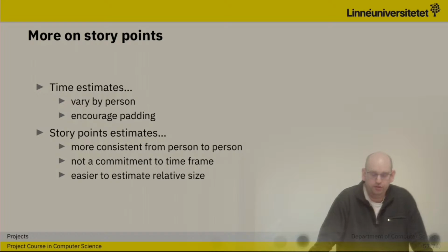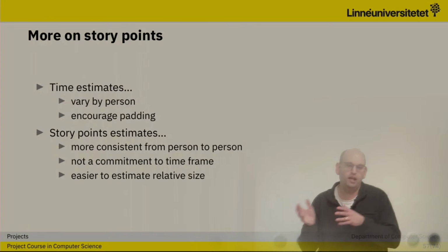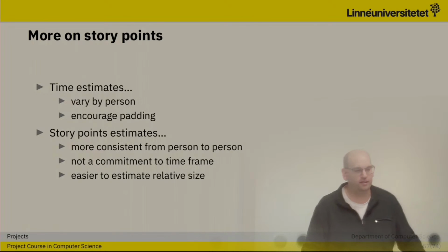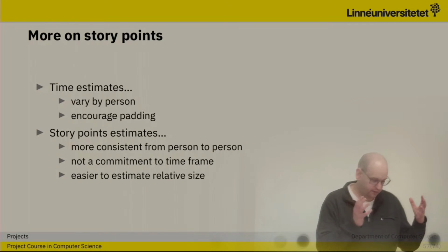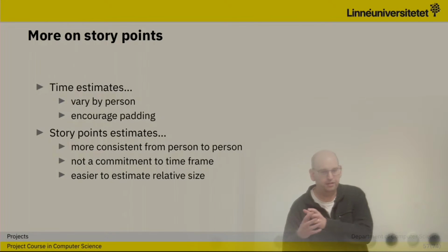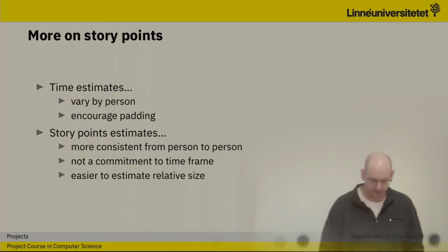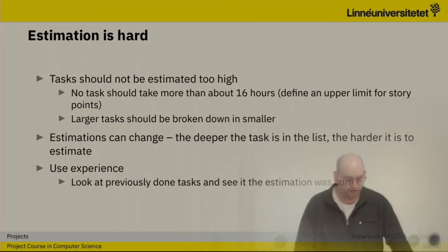But it has been shown that story points are more consistent from person to person. It's no commitment to time frame, and at the very least, it's easier to have these relative sizes to see that the logging system is not that complicated as the make reservation part or whatever it might be. The one is larger than the other. But estimations are hard,